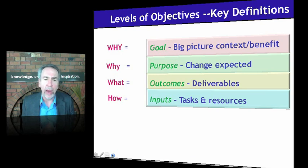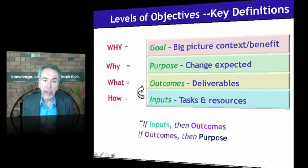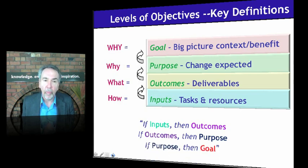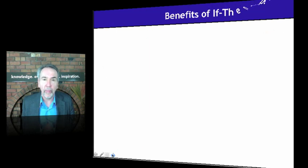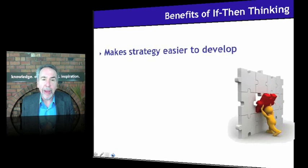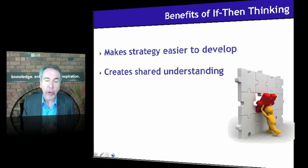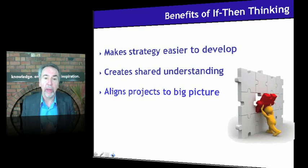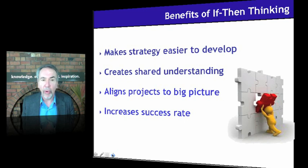There's a definite, specific, logical relationship among these objectives, and we can put it in the form of a phrase: if inputs, then outcomes; if outcomes, then purpose; if purpose, then goal. So we've structured our project into a strategic hypothesis, giving much more precision and rigor to our efforts. The benefits of if-then thinking: first, it makes strategy easier to develop; second, it creates shared understanding so people can agree and reach consensus; third, it aligns projects to the big picture; and finally, it dramatically increases the success rate, because so many projects produce outcomes but they don't ripple up to the strategic context.